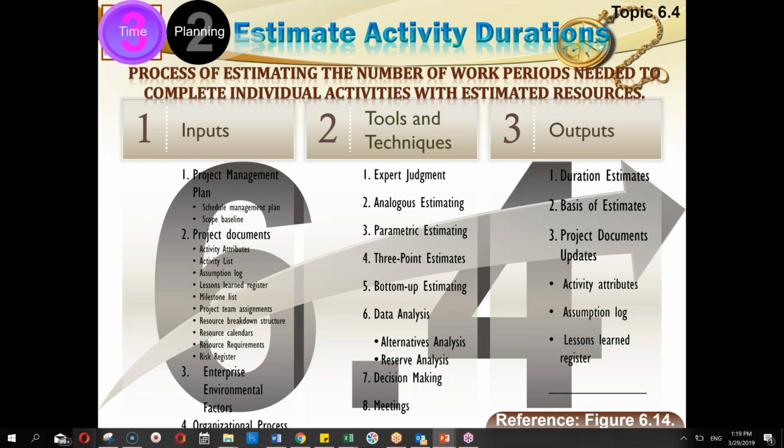Is it so? Yes, 24. Yes, around that. So, 24, because I have divided into 6 parts, 4 for most likely, 1 for pessimist and 1 for optimist. So I will divide this 24 by 6. So it will give me the size, the estimated duration which I should cater. So it comes out to be 3.83. So 3.83 is my new duration.